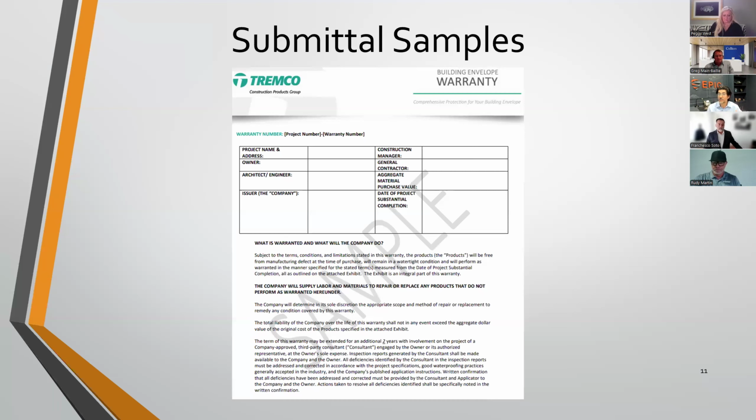So when we were first just maxing out the warranty at a 10-year warranty, we're now able to get a 25 because we have that uniformity everywhere. But if you have a break here and a break there, and I want to do everything besides the pool, okay, well then the max you can get is going to be X instead of X plus Y.